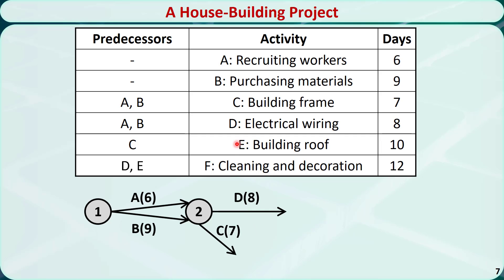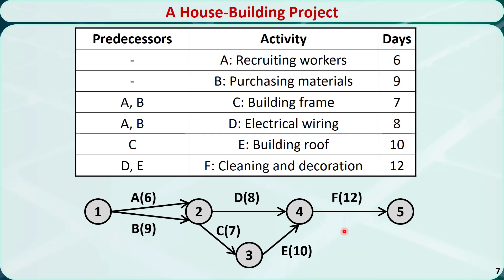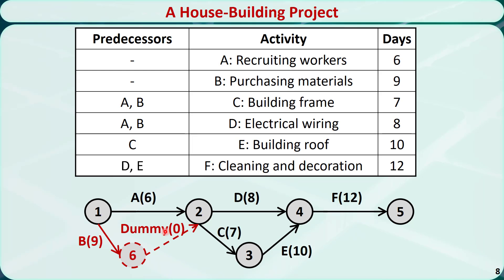After finishing building the frame (activity C), we can start to mount the roof (activity E), which takes 10 days. Finally, after the wiring and roof activities D and E are completed, we can start to clean the construction site and decorate the house (activity F), taking 12 days. The initial network violates Rule 5 because two arcs connect nodes 1 and 2, so we introduce a dummy node 6 and a dummy activity with duration 0. Then we renumber the nodes — changing them to 2, 3, 4, 5, and 6 — so that completion nodes always have larger numbers than beginning nodes.